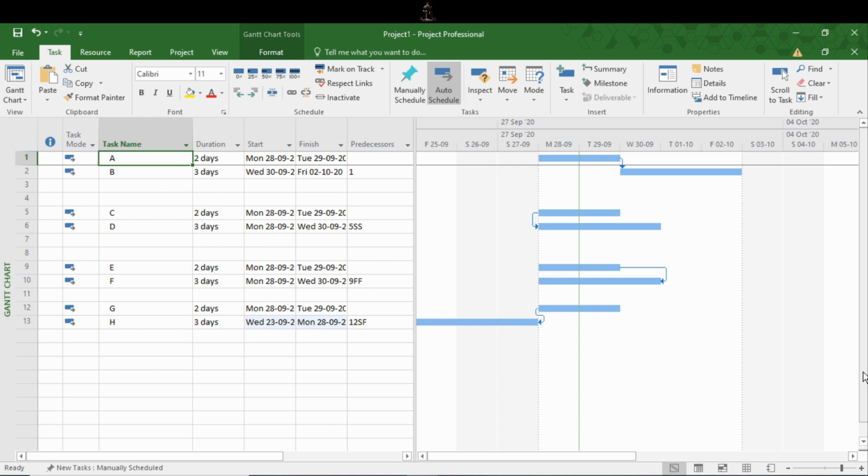Let's move to the start to finish relationship. This is the rarely used relationship in logical sequencing. It is not recommended to use it because most of them we can replace with the start to start or finish to finish relationship by doing some adjustment. Here, successor activity is represented first, then predecessor. This is not the case for the first three relationships we have seen earlier.